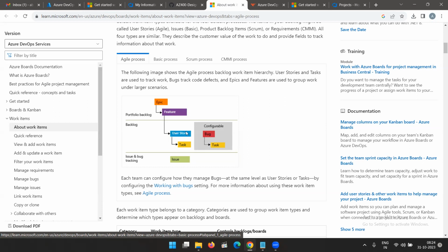Inside the feature, you have different user stories now. And inside one user story, you have the task. A user story can be what you have to do. Like, a credit card of 16 digits should be accepted over there. That is the user story. For that, you have created a task. You have to write something for that. That will be a task.